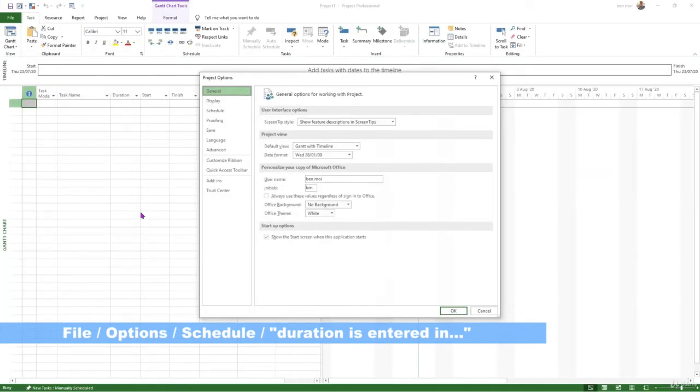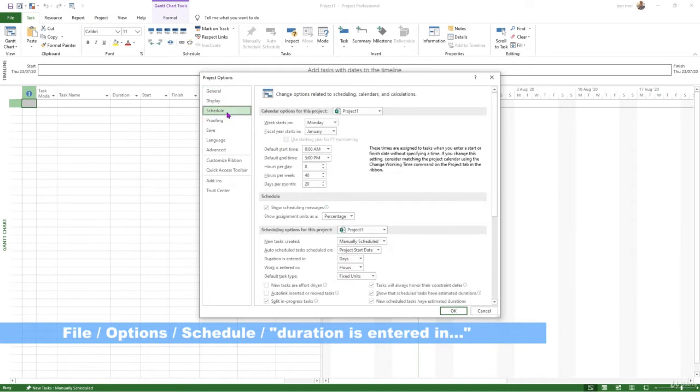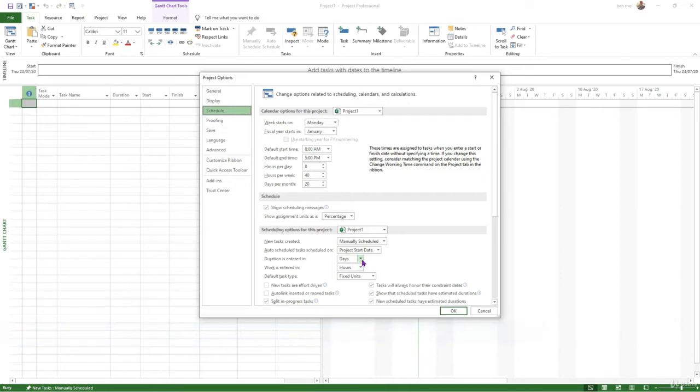and when you start a new project, you should know if it's going to be a long project or a short project. And you go into the schedule here. Durations is entered in days. Let's say we want to work on a 2 to 3 month project, it's fine. If you want to work on a 2-week project, you might want to put hours instead. So the duration, that's the length of the task, we leave at day. For me it was day, so I just leave it there.